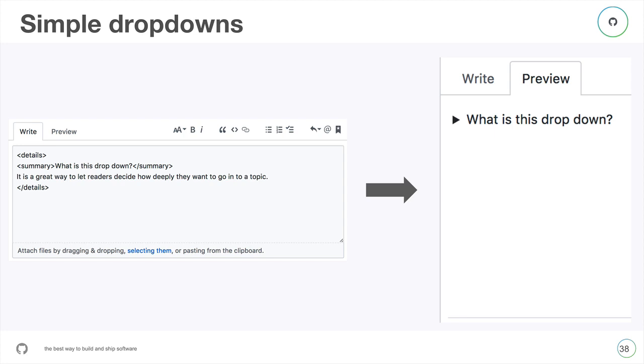Do you document the calls later on? Yes, always. That's a great question. So we believe that any team meetings that we have, we should typically, again, put a URL on it, right? Usually if we're jumping on those calls and having a conversation, then we're probably going to make some decisions about a path forward, and that should absolutely be documented for the rest of the team to see. So yes, we always do document those calls later on. And we'll put them right in the same issue. So we'll usually just say, hey, Hector and I jumped on a Zoom to talk about this. Here's what we think as far as path forward.